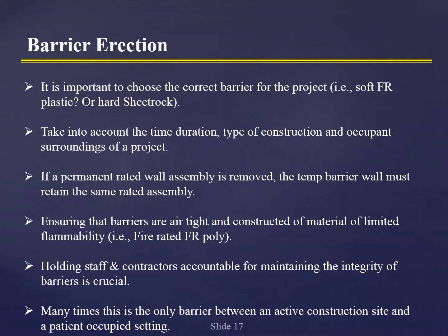Again, a rated wall, very important that if you put in a temporary barrier wall because you've taken off a wall, if it's a rated wall, it has to be to the same rated assembly, or you're going to be into some possibly very serious infection, interim life safety situations.